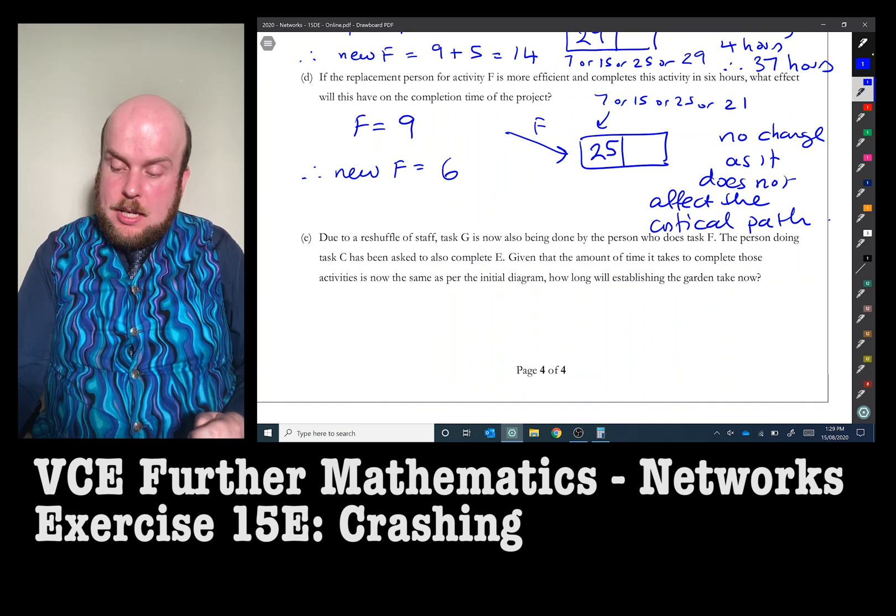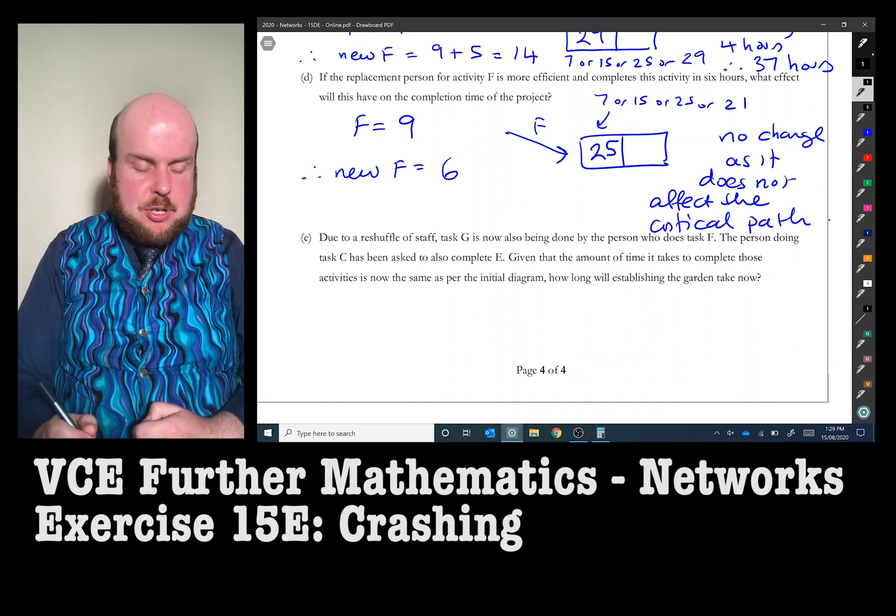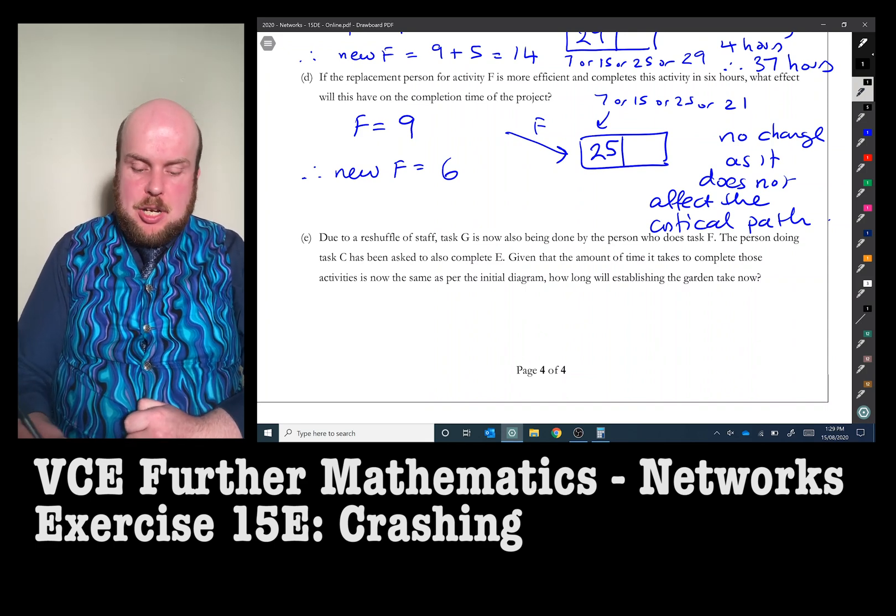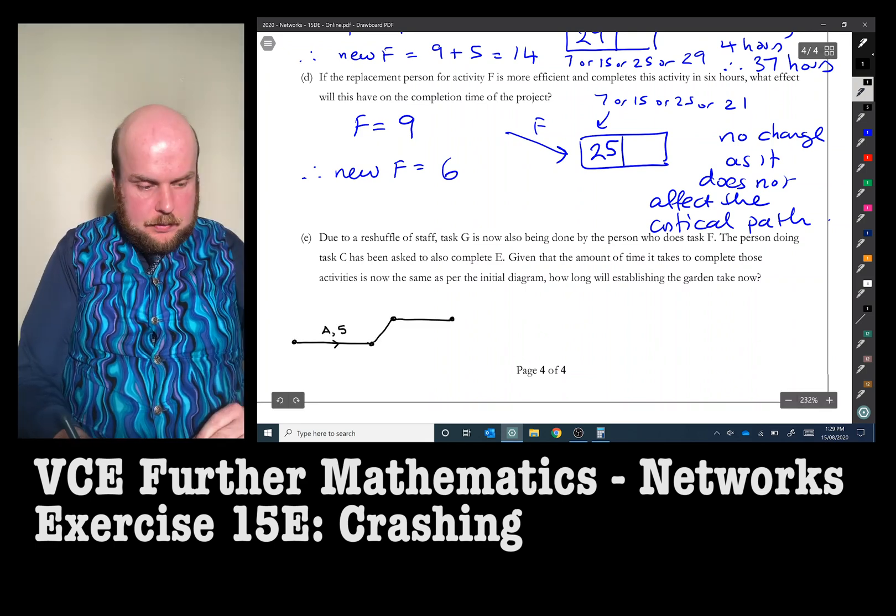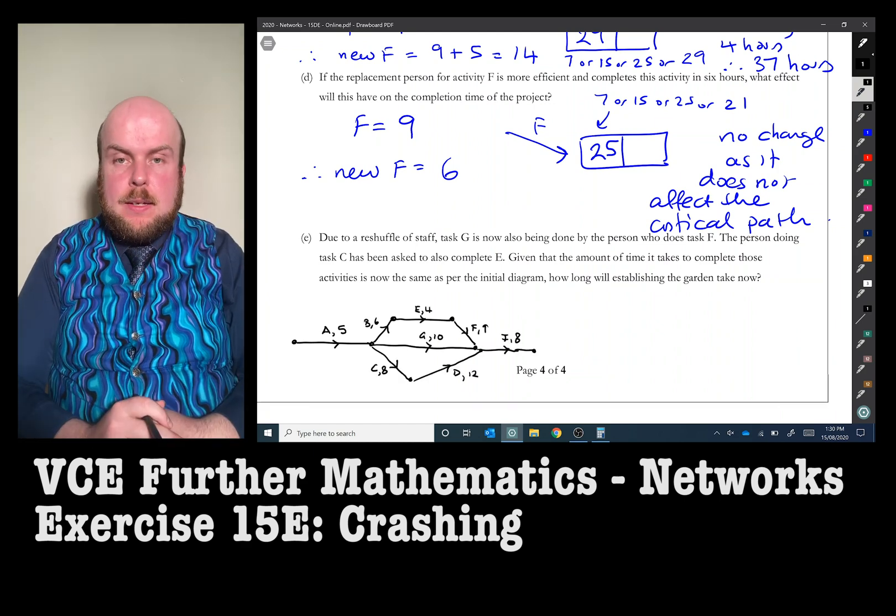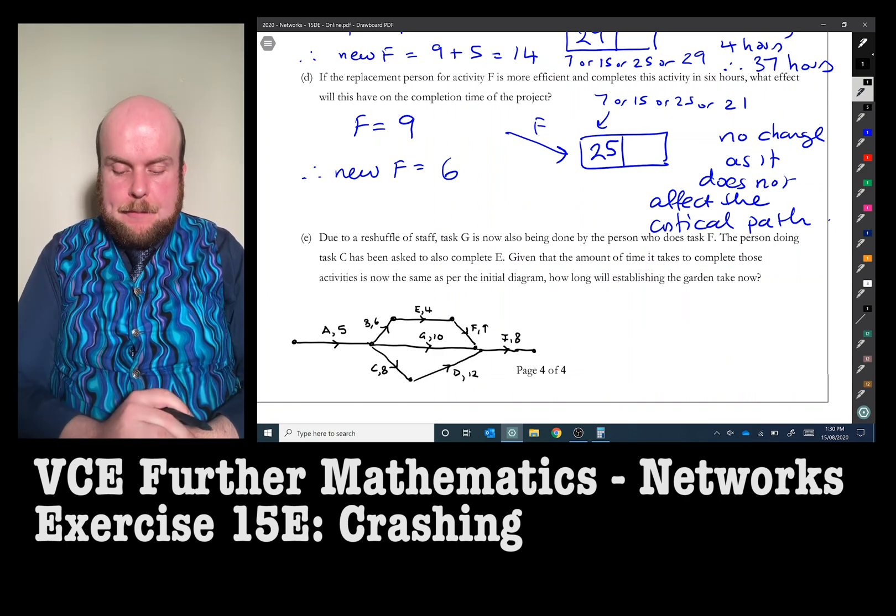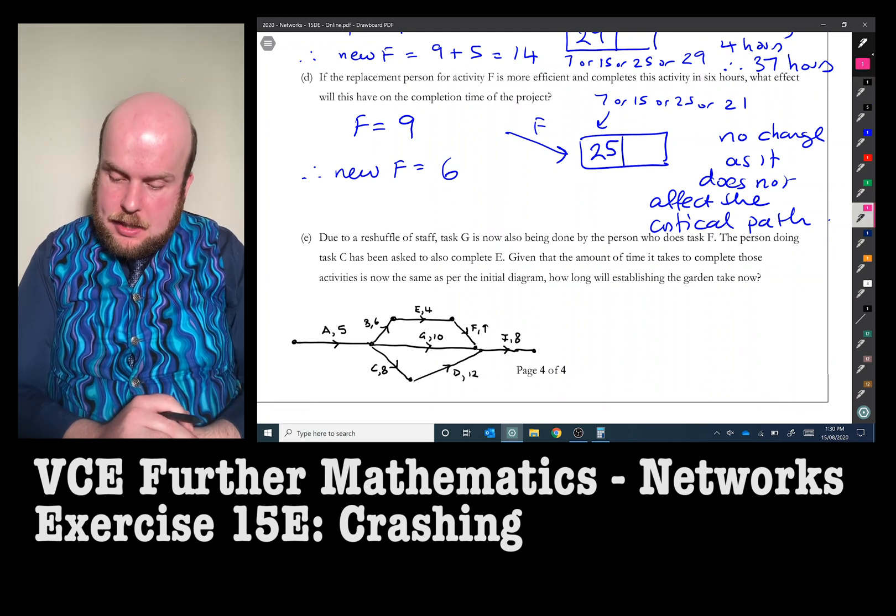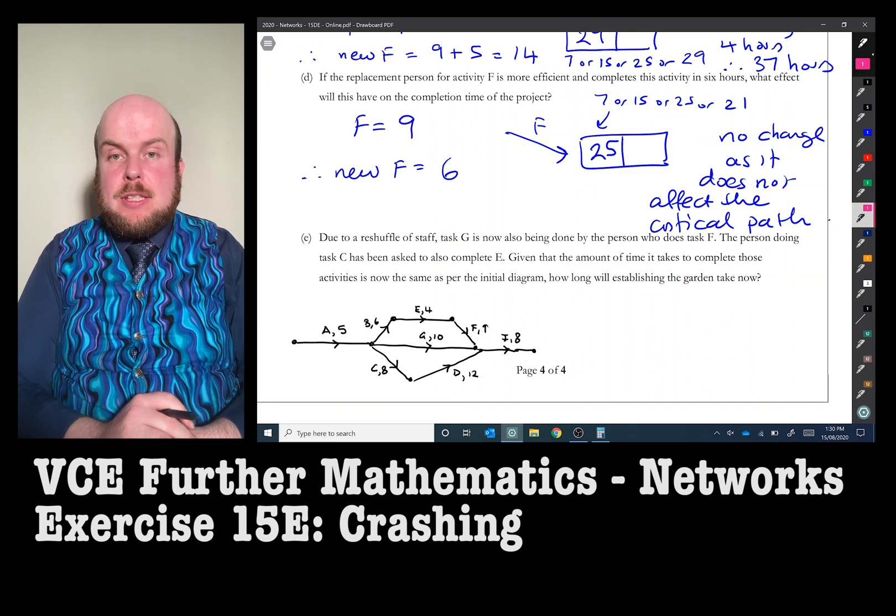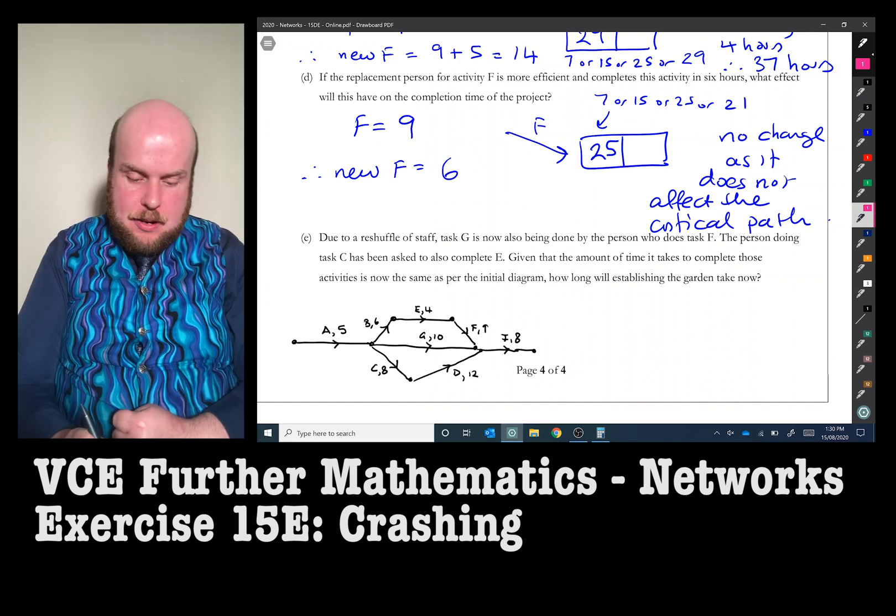So what I'm going to do is I'm going to redraw just that middle section of the network and show what will be changing. So that was just that middle section of the network, and what I'm going to do is I'm going to redraw it slightly. It says there that activity G is being done by the person who does activity F. So in other words, the predecessor to F will have to be G. So I'm going to bend it out of the network.